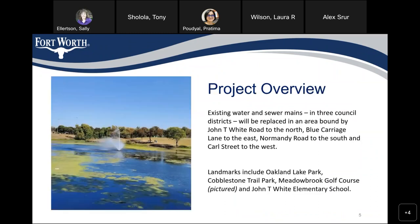In this project, we are going to replace the existing water and sewer mains in three different council districts. The area of the replacement is bounded by John T. White Road to the north, Blue Carriers Lane to the east, Normandy Road to the south, and Carl Street to the west. Landmarks include Oakland Lake Park, Cobblestone Trail Park, Meadowbrook Golf Course, and John T. White Elementary School.